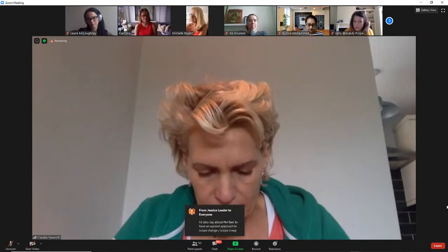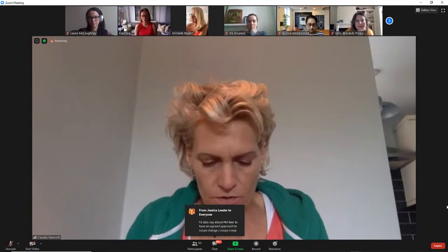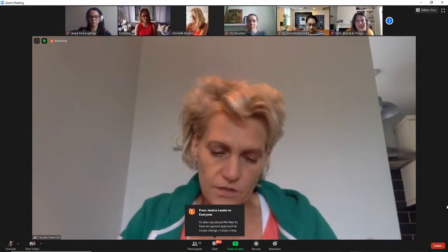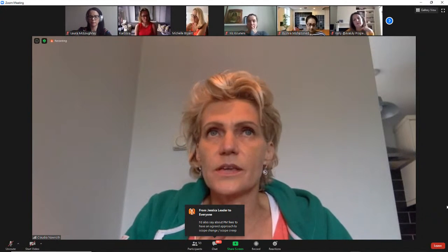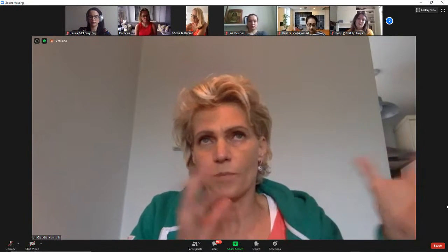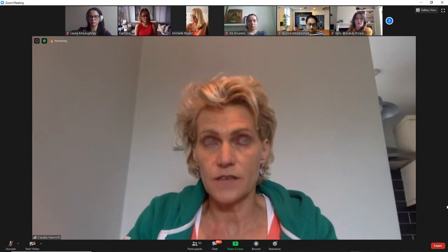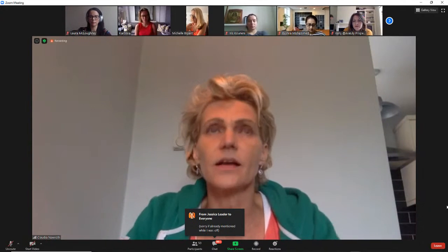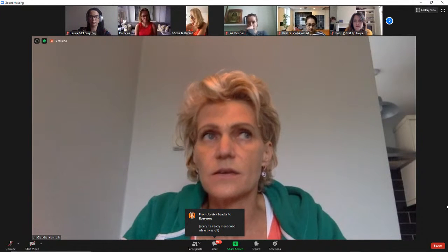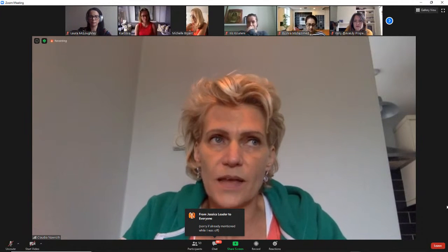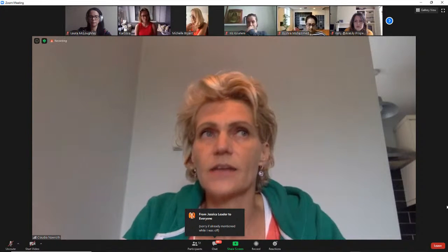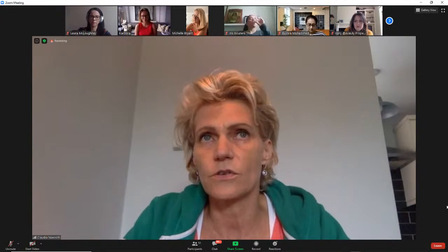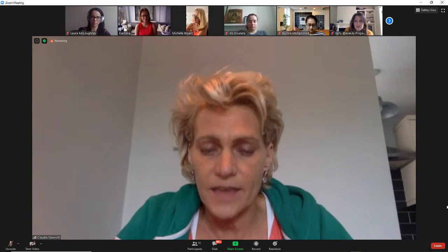So what I did when I developed my contract is I tried to give definitely a fixed cost for everything, the whole package before the build phase starts. So the whole planning, the preparation and the planning, and that's a fixed fee. So that's basically the end of the planning phase. And then after that, I charge per month or per week, depending on the duration of the project. And that's when I take a risk.